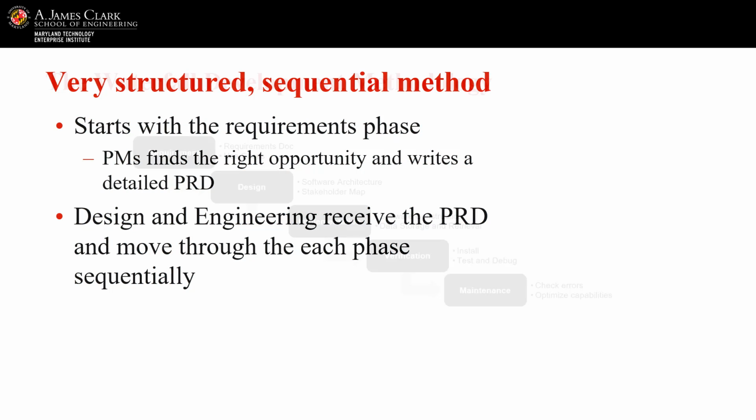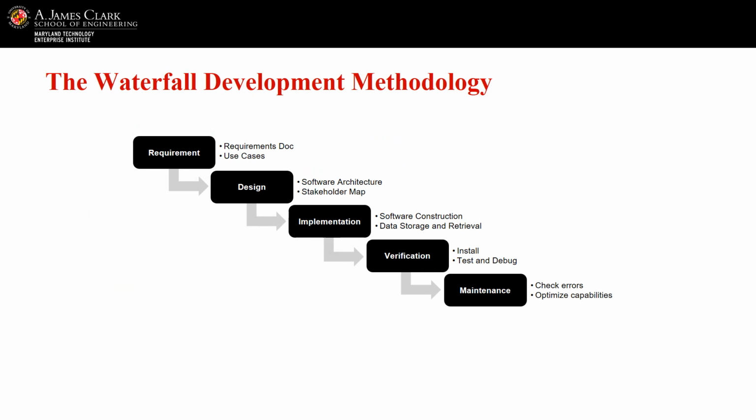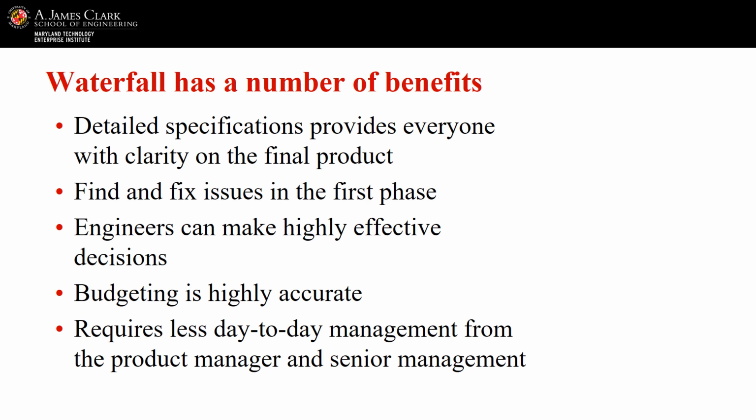Waterfall development starts with the requirements phase, where the product manager has the most to do, finding the right opportunity and writing a very detailed PRD. After the requirements phase, engineering and design takes over, beginning with the design step and moving all the way through testing and integration. Waterfall has a number of benefits.